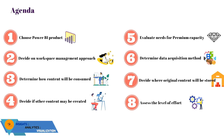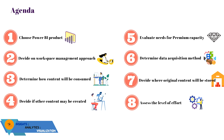In Stage 2, first we have to choose a Power BI product. Secondly, we have to decide on a workspace management approach. Thirdly, we have to determine how content will be consumed. After that, we will decide if other content may be created. In step 5, we evaluate needs for premium capacity. In step 6, we determine data acquisition methods. In step 7, we decide where original content will be stored. And lastly, we assess how much effort and what resources we are going to need.